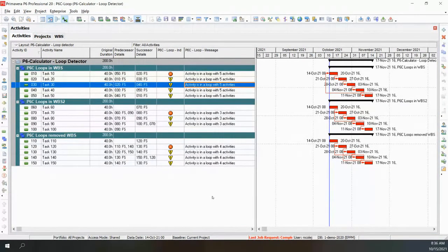Okay, so when you're doing portfolio reporting on many capital projects or many outages as well, you want to make sure that reporting method is consistent so that your data date is moved consistently. What we found was when there's loops, which you don't always know because you might do a bunch of logic changes and you didn't have a chance to reschedule, you may not know that you made a loop by mistake. So we created this loop detector, and it works really, really well.